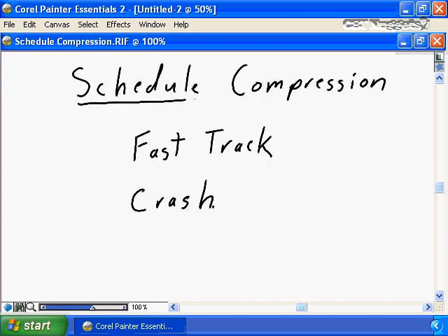As a result of the work you did during project control, tracking the actuals and entering the revised ETCs, it's entirely possible that your project is forecasting a later finish date than originally planned. It's time to start looking at what techniques we can apply to compress the schedule and improve the project end date. These compression techniques can be categorized as fast tracking and crashing.